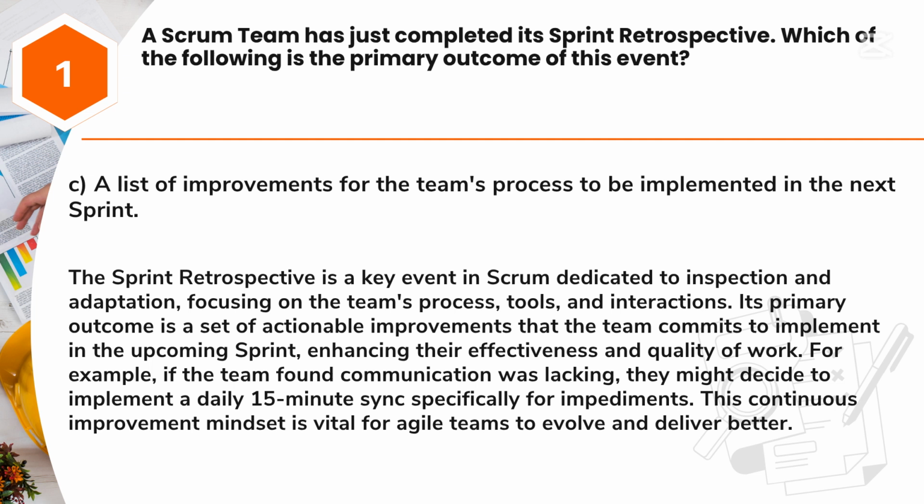For example, if the team found communication was lacking, they might decide to implement a daily 15-minute sync specifically for impediments. This continuous improvement mindset is vital for Agile teams to evolve and deliver better.